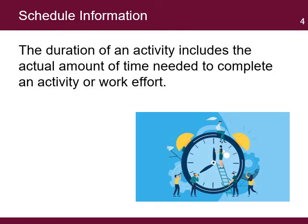The duration of activity is the amount of time needed to complete an activity or work effort. The estimation should take into account the number of people available for the project. For example, if an activity takes one week for one person, the estimate may become two weeks if the person works only half time. This information is important at the moment of determining the total time needed for the project based on the resources available.